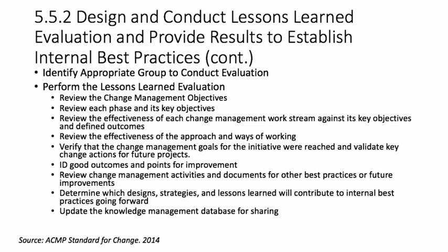Identify good outcomes and points for improvement, including any possible mitigation or improvement based on the current initiative. Review change management activities and documents for other best practices or future improvements. Determine which design, strategies, and lessons learned will contribute to internal best practices going forward. And update the knowledge management database or common document storage location for sharing the lessons learned with other change management practitioners. The change management lead produces a document that presents lessons learned in a logical manner.